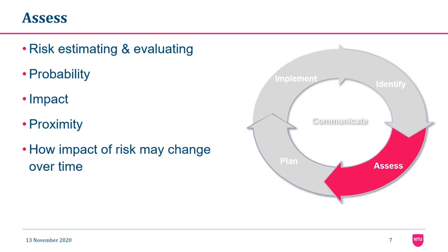Assessment covers two actions: estimating and evaluating risk. Estimating is about assessing the probability, the impact, and the proximity for each threat or opportunity. And evaluating is to group all the risks together, both threats and opportunities, and get an overall risk value for the whole project.